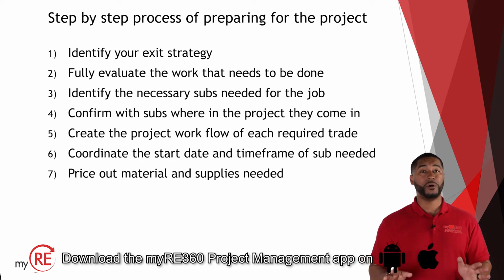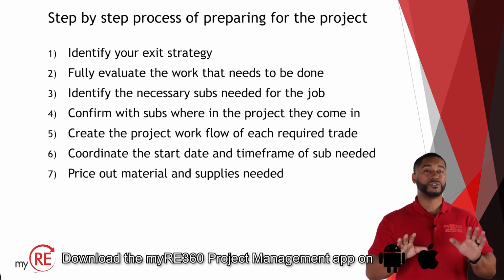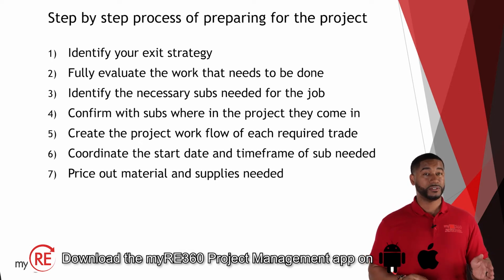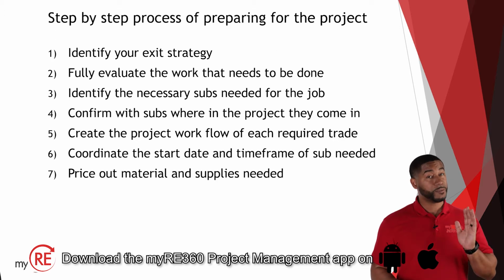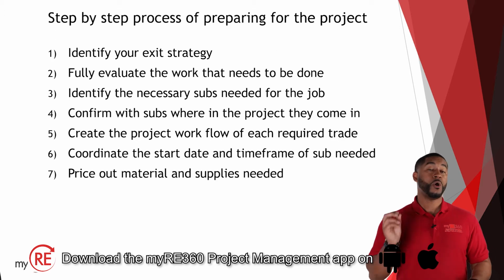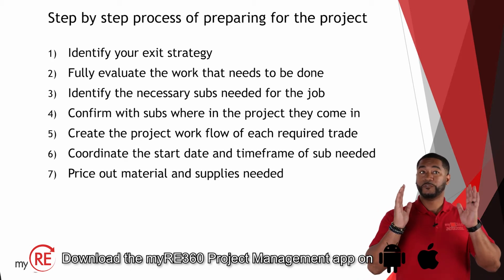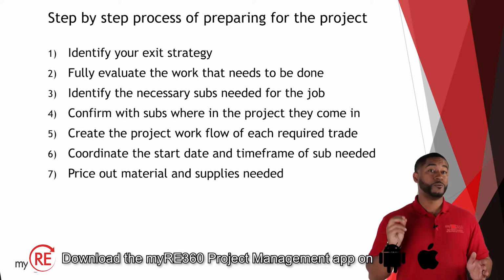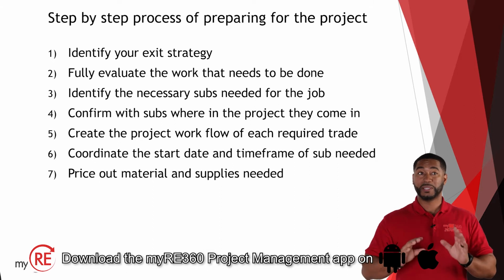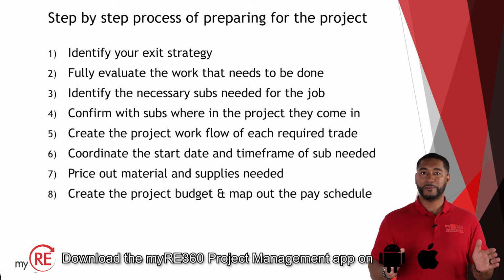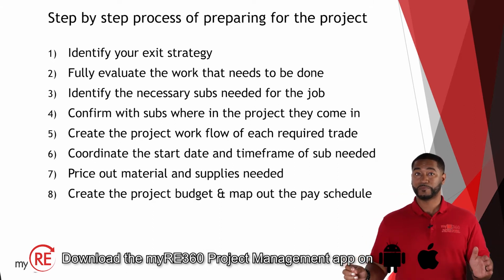Let me take a moment and pause and make sure that you understand when you're dealing with your subcontractors, it is essential that you have the conversation on who's going to pay for the material. Are you expecting the subcontractor to pay for it, or are you going to provide that material as part of any pricing that you agree to? So once you've priced out and identified who's paying for the materials and the supplies needed, you then need to ultimately create your project budget and map out the pay schedule.